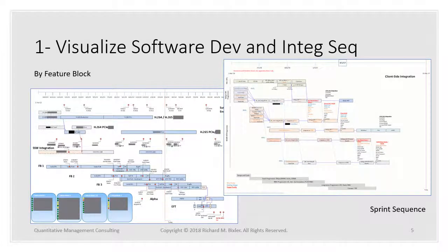It shows a development sequence to develop a first increment of functionality, working path first, to maximize usability of prototypes across all participating organizations. For each of several following functional increments, the image shows aggregation of function and development and integration sequences. Finally, the image shows key dependencies among sprints, including dependencies on hardware availability from the green bars at top. The plan visualized by images of these kinds supports several desirable effects.